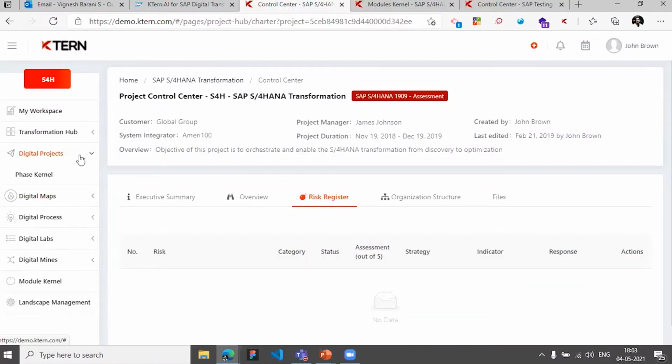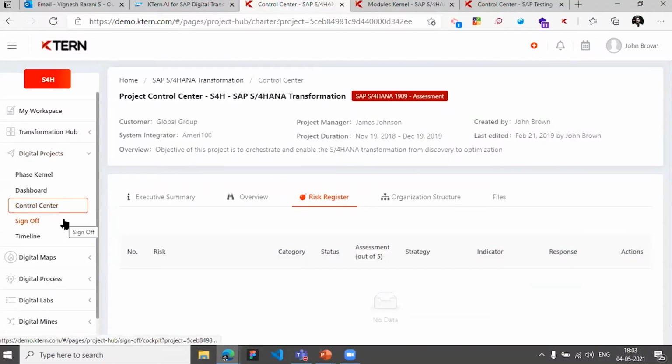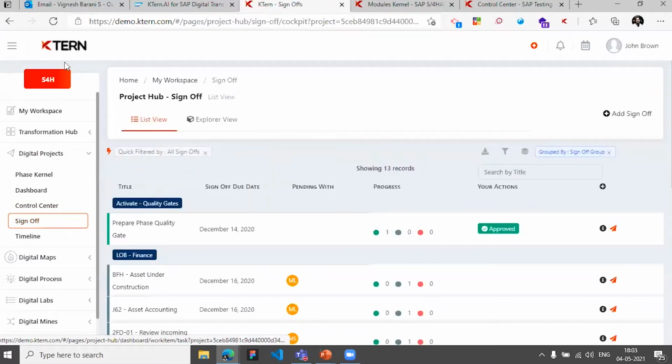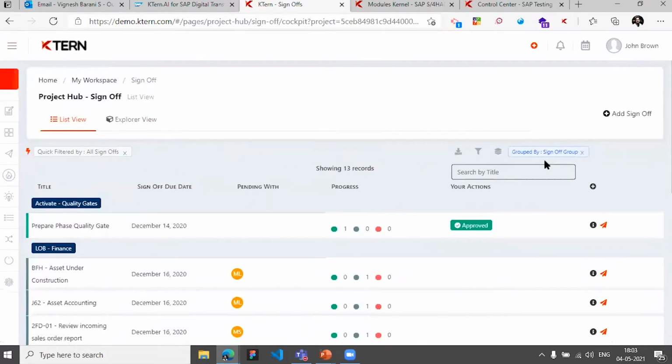A major thing we've seen as part of this is sign-off in terms of remote execution. Because we are executing things remotely, imagine 100+ process items that have to be signed off by different SMEs who are on site, and you might have to get approval from each of the business SMEs, and then the BPOs, and then the project manager, and it just goes on.